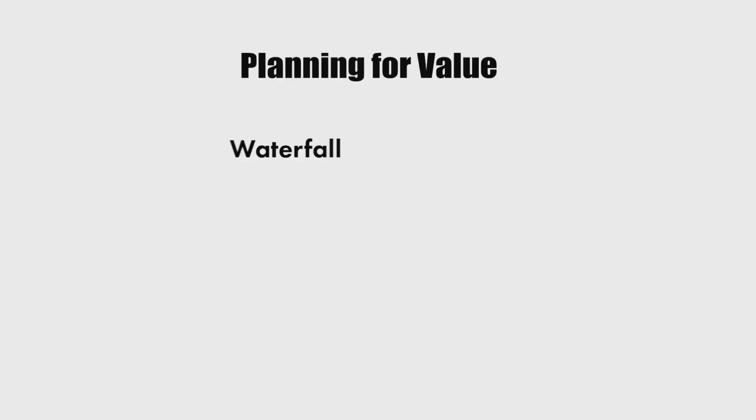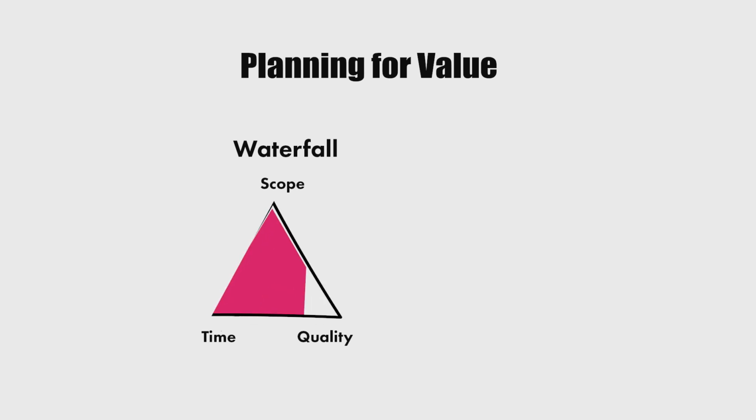It's a big difference how we prioritize in Agile contra the traditional plan-driven approach. In the plan-driven approach, time is fixed, scope is also fixed, and we want to deliver everything that we thought of. But quality is not fixed. So quality many times suffers in traditional waterfall projects.